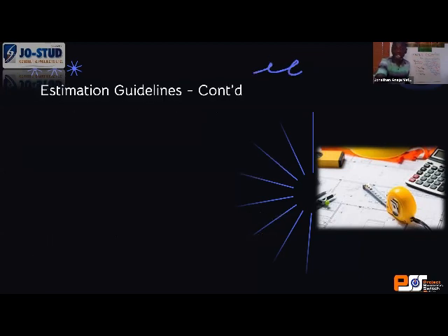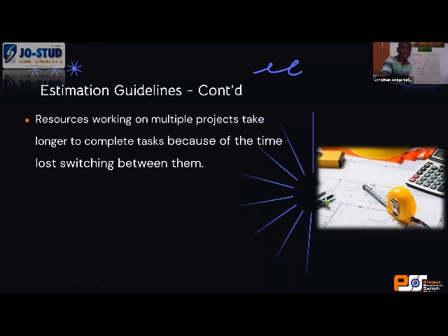Always use 80%. Personally, that's what I do, it has worked for me, and I've advised people to do it, and it worked for them too. Don't always think that your masons should be 100% accurate, right? Now, when I am dealing with the mason on site, I will not tell the mason, don't worry about it, I have assumed that it's only 80% of the work you will do. I won't say that. So come here, you're a QS, you hear me? You still force the mason to do the 300 he promised you every day. But you know at the back of your mind that what you are prepared for is 80% of the work.